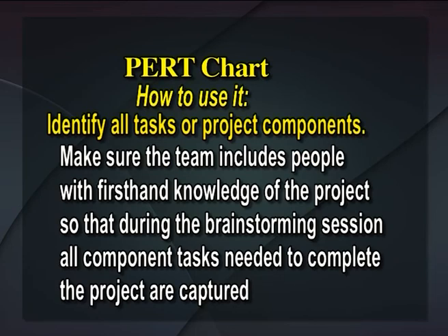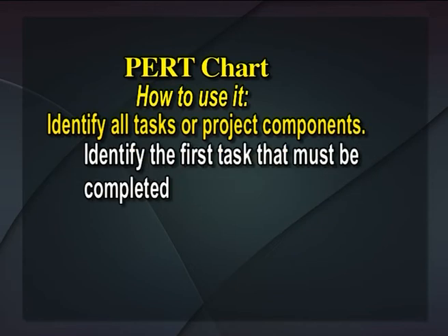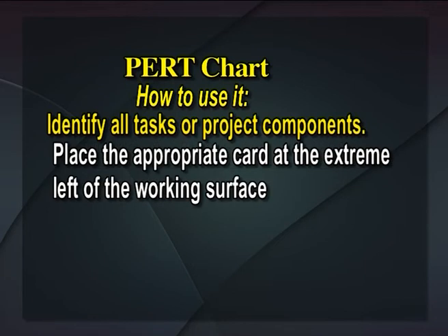Make sure the team includes people with first-hand knowledge of the project so that during the brainstorming session, all component tasks needed to complete the project are captured. Document the tasks on small note cards. Identify the first task that must be completed. Place the appropriate card at the extreme left of the working surface.